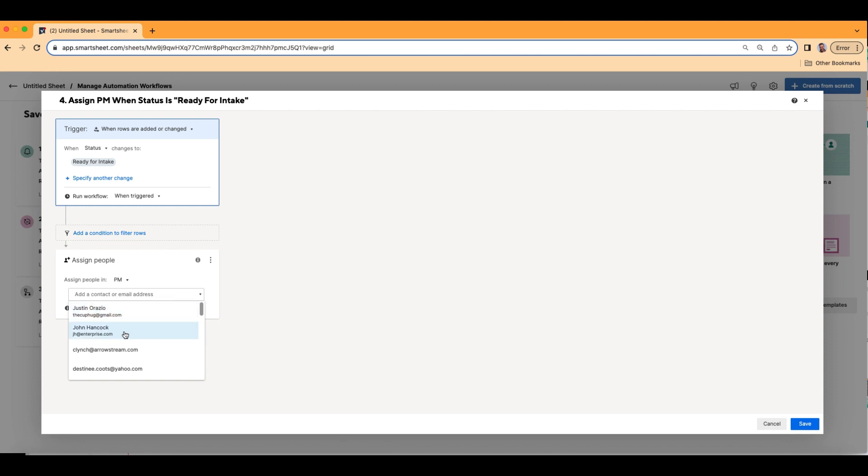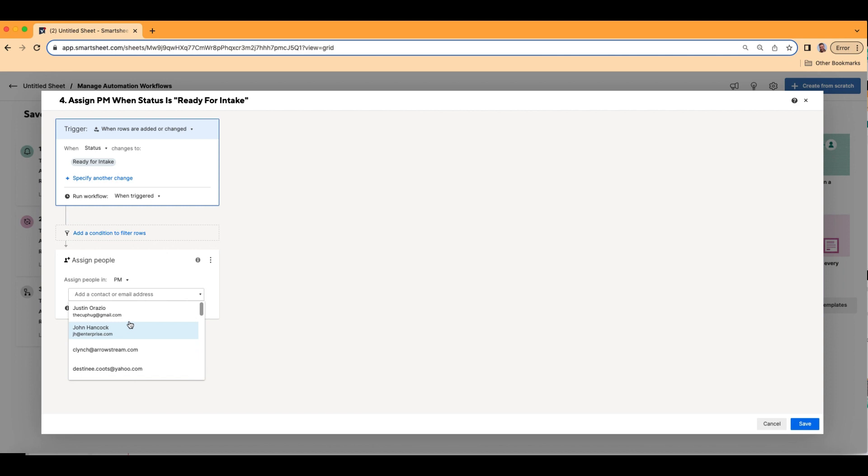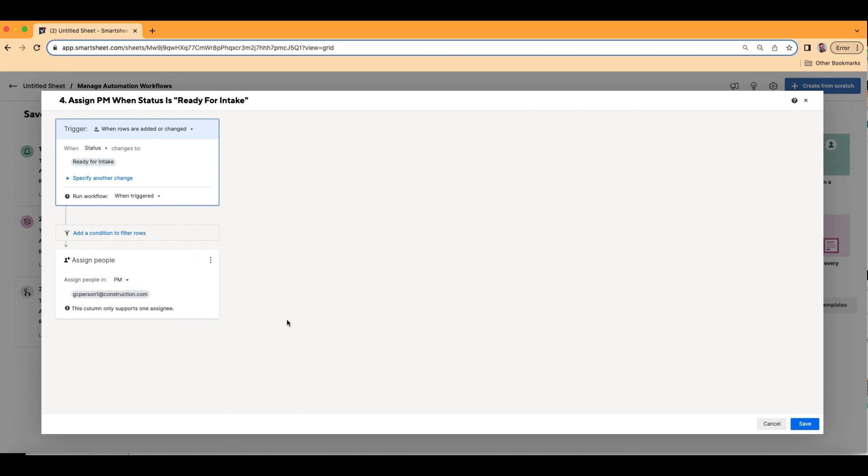Or let's choose this person. Alright. So anytime that status changes to ready for intake, I automatically want it to assign to GC person one. Alright, so let's go and click save.